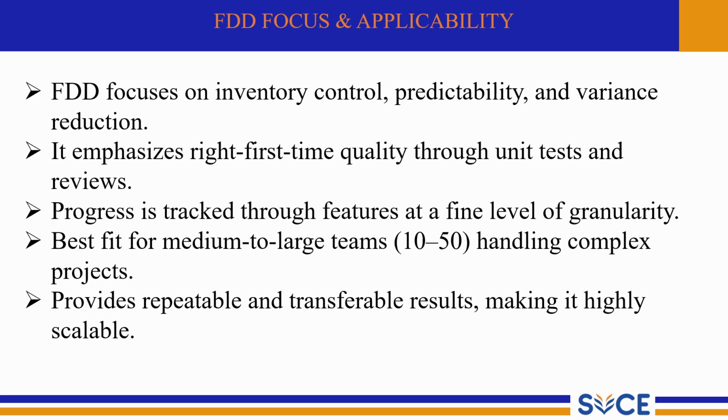It is a best fit for medium to large teams, 10 to 50 people, handling complex projects. While Scrum and XP work best for small teams, FDD was designed for bigger teams and managing complex domains. It is structured, and defined roles help coordinate many people without losing focus.